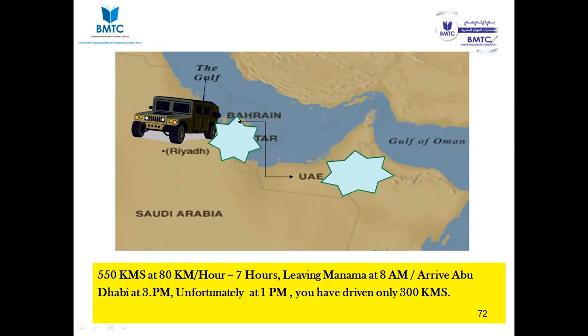The management is not giving you a target to achieve? Everyone connected here, Varun, Pavan, Arun, you will all have a target to achieve, right or wrong? Yes. So the TCPI, take this one: if it is equal to 1 or less than 1, you can achieve your target. If it is more than 1, it will be very difficult for you to achieve, right?